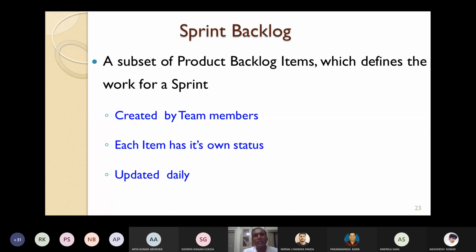And yesterday you have already finished 3, and so still you are having some time. So 1 more functionality can be taken. So next day beginning you can say that you are supposed to finish 6, but already you have finished 7 of the functionalities. So you can take more functionalities from the product backlog. So the sprint backlog is updated daily during the sprint.